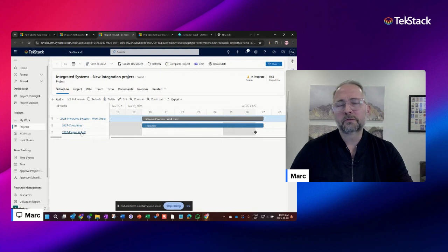You don't often mix billing types, but we are seeing more and more. Let's say we have a fixed price project, and maybe the change requests are coming in as time and material. We can handle hybrid scenarios, or you might have projects that are entirely fixed price or projects that are entirely time and material. Here, for the sake of example, I've blended the 2 together on a very, very simple project.